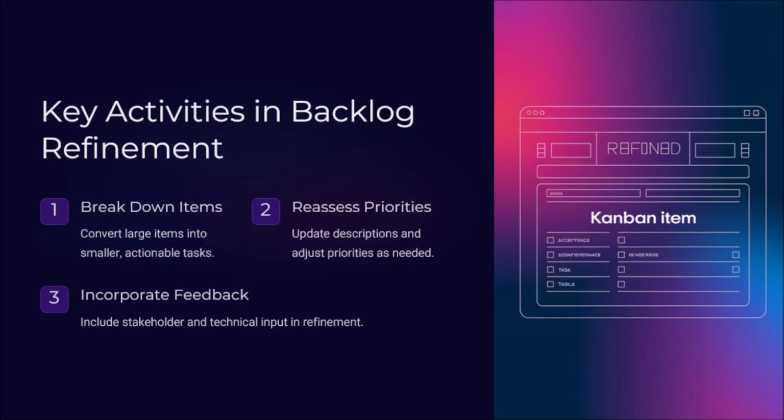An example of a backlog refinement is, let's say, a refined backlog item, or one of these features, that will be more detailed, with its acceptance criteria, with its, let's say, plans to be implemented, with its benefits. So this is how you refine an item within the product backlog: by setting the acceptance criteria for that item, clarifying how it will work, what the value is, and how it's going to serve the stakeholders. And with that being said, this is how you refine an item within the backlog.